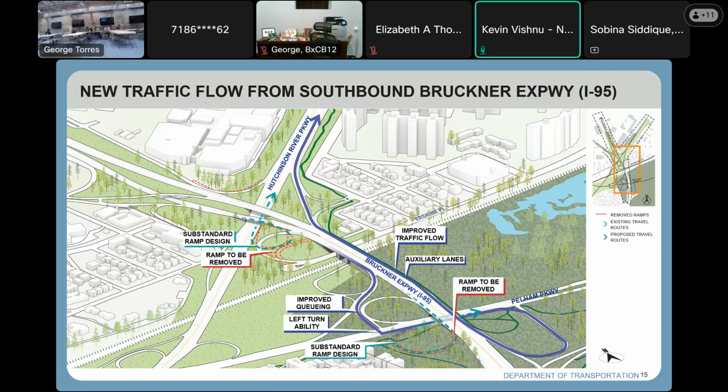Okay, so I said we'll get you a copy of this presentation. It might be the same or it might be a little bit more public friendly. That's the first part. The second part is about the air policy you asked about. All New York State DOT projects go through strict screening for any type of effects to the air. This is a result of the traffic study. I know we were doing extensive traffic modeling. I'm not sure that's completed yet, being that we're still in preliminary design. When the air analysis gets completed, it gets documented into the design approval document. We don't have design approval yet, so when we do get it, it'll be in that report, and I imagine you'll be able to have a look at the results.